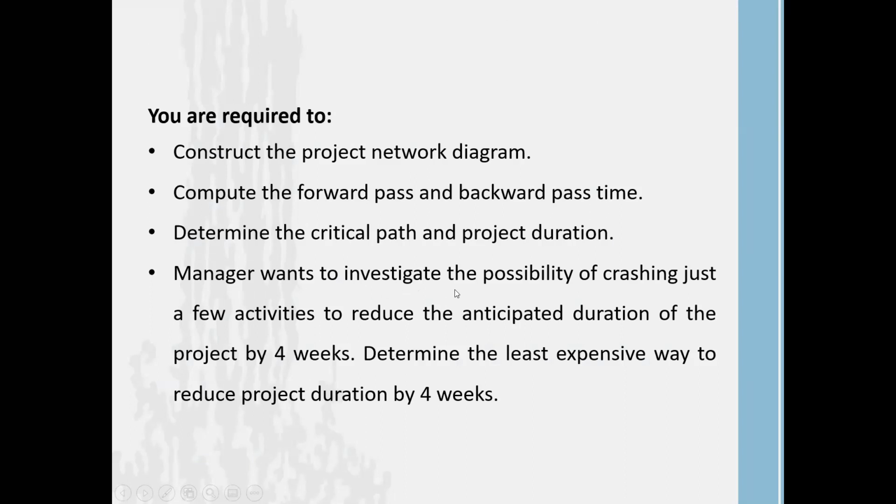Now the manager wants to investigate the possibility of crashing just a few activities to reduce the anticipated duration of the project by 4 weeks. For example, if your completion time is 44 weeks, now it needs to be completed within 40 weeks, so they need to reduce it by 4 weeks. If the normal completion time is 50 weeks, now you need to complete in 46 weeks. Then determine the least expensive way to reduce the project duration by 4 weeks.